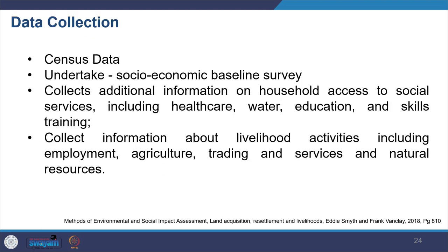So when you do the baseline study, the key data source is the census data, and you undertake a socioeconomic baseline survey. When you undertake the survey, you collect data on households, how much access they have to services like education, healthcare, and water, what kind of capacities are there, and what kind of training institutions are there. And you also take information on what kind of job opportunities and livelihood opportunities are there.